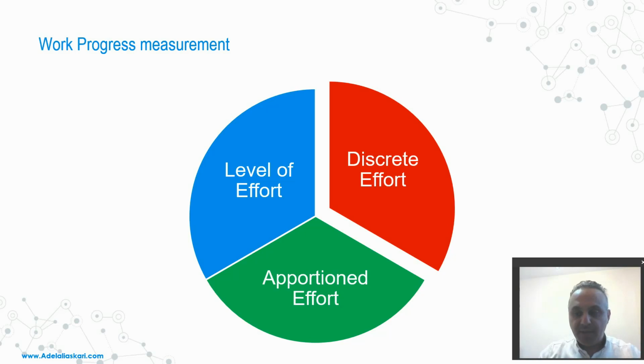Then the percent complete of the LOE is the ratio of the whole progress of the work package or the whole progress of the project. We cannot consider any specific amounts regardless of the whole progress of the work package or project. And these LOEs are necessarily characterized by a uniform rate of work over a period of time.